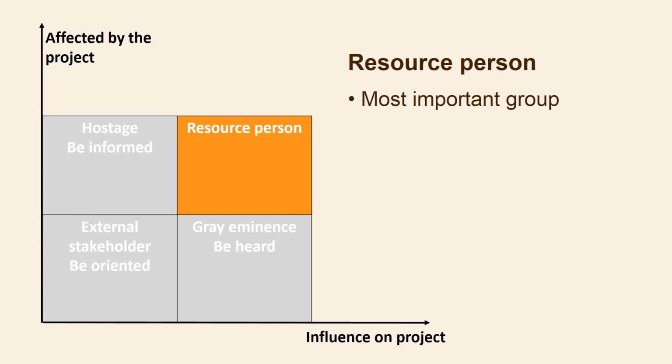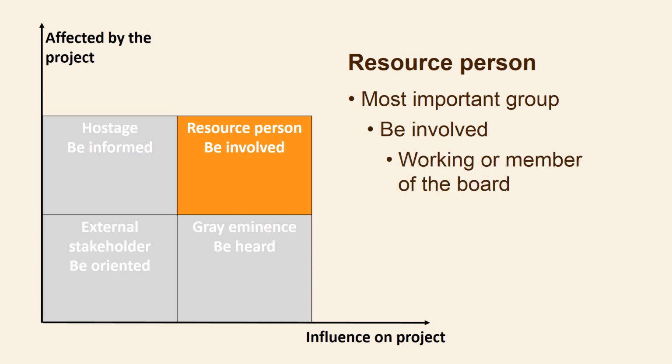Resource person is the most important group. They have influence on the project and they are affected by the project. It is very necessary that the project manager convinces them that the project is good for them. They must be positive. This is best achieved if they are involved in the project, either by working with the project or by being a member of the project board.